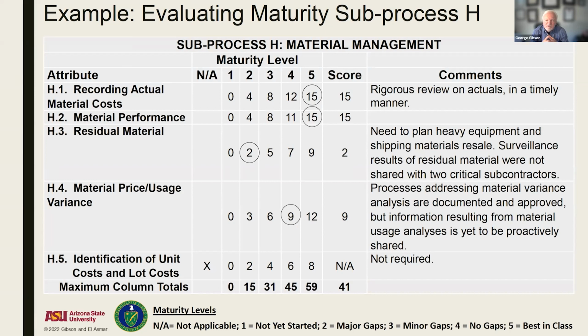Now, as we said earlier, and Manir mentioned earlier today, and we talked about a little bit yesterday, maturity is rated on a 0 to 1,000 scale. If we look at total maturity, if everything is level 5, then you're at 1,000. Probably no project or program has ever been all at level 5. And so somewhere in here, you're kind of on that sliding scale. Now, we developed these weights through our workshops that we talked about yesterday.